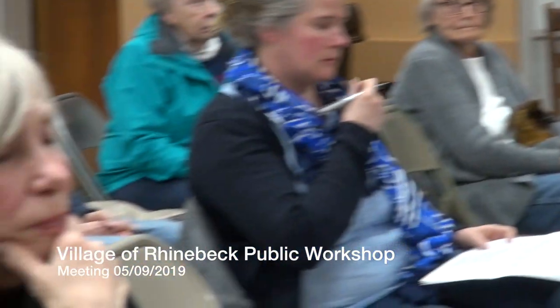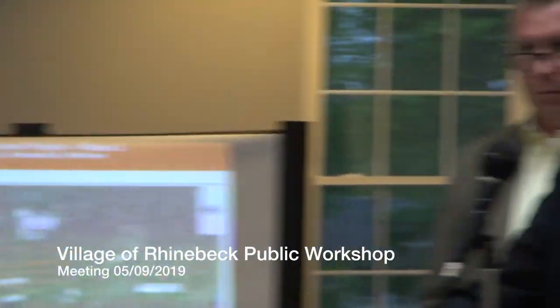Okay, thank you. Is it possible, in order to be sensitive to our gardens, could we independently dig up our border lines before you get there? So they're exposed, do you know what I'm saying? I guess the question would be, are your gardens out in the public right of way, or are they interior to your own property? Well, you're saying that you're going to have to go right to the house. No, the village contractor is only going to work to the property line itself. And then you're responsible for going back.